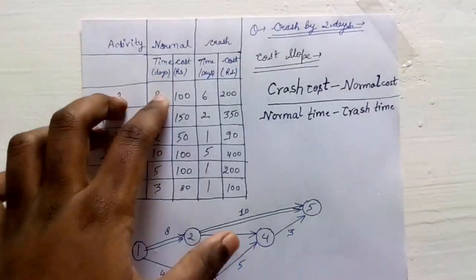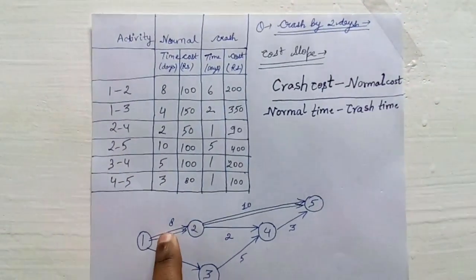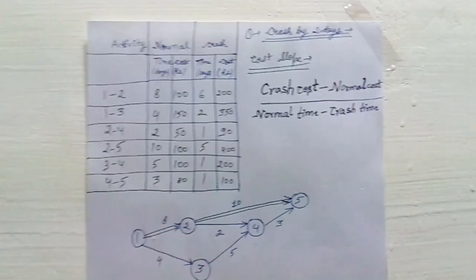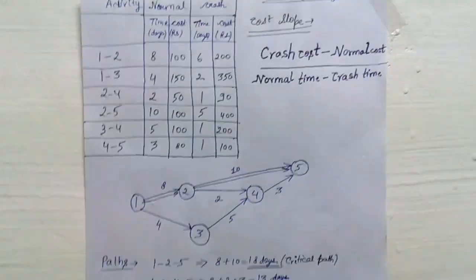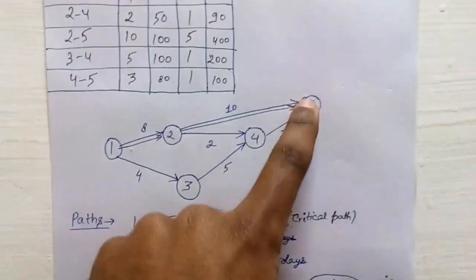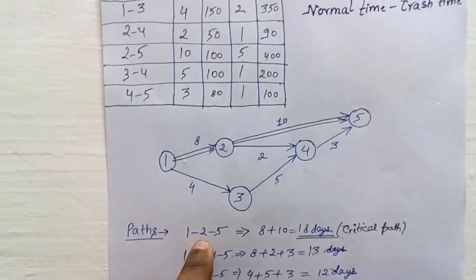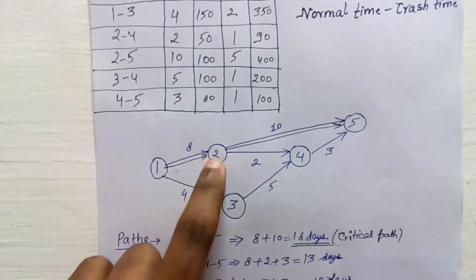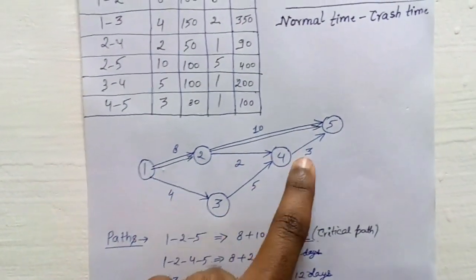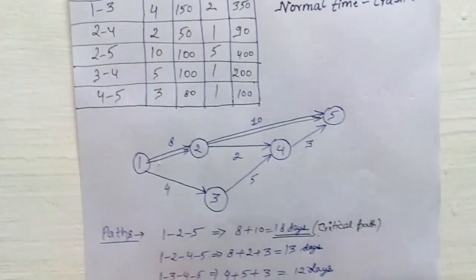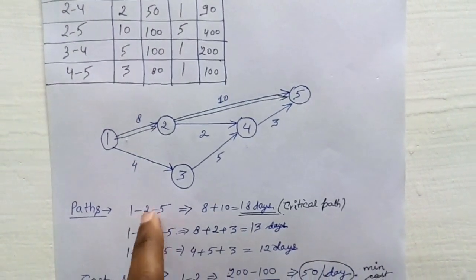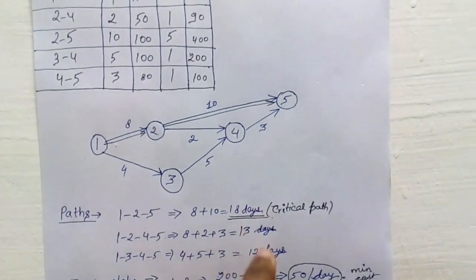Now there are 3 paths. First path: 1 to 2 to 5. Second path: 1 to 2 to 4 to 5. Third path: 1 to 3 to 4 to 5. You calculate the total time for each path: 18 days, 13 days, and 12 days respectively. The maximum is 18 days, so that is the critical path.